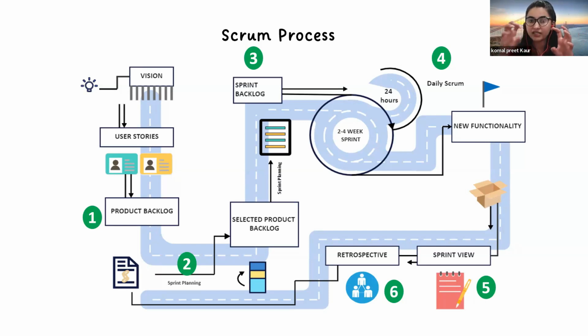So whatever tasks we have discussed in sprint 1, might be one task, it was a very big task or a very small one. It was not accomplished due to some reason, right? So again, that will be added back to the product backlog. Again, discussion will happen for sprint 2, and this is how it goes. So I think I am done with my webinar session.